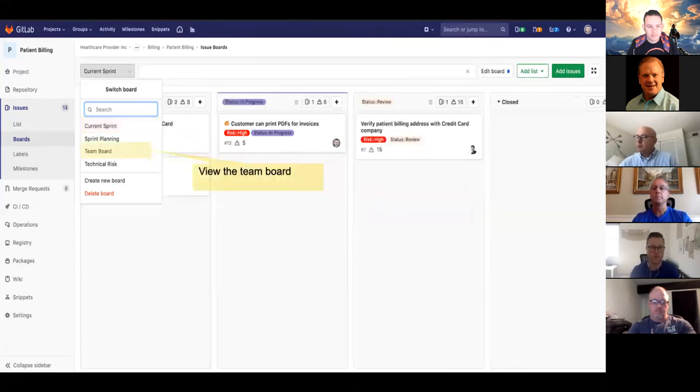And that's what we'll go in to see, the current sprint. I actually need to probably fix a couple things here, where this drop-down menu is not showing on the click-through. But the current sprint is going to be showing that sprint 3 that we are assigning the issues to. So if I am up in edit board, I can have this board filtered by anything that's assigned to the sprint 3 milestone, and that'll populate on the left side here in the open swim lane.